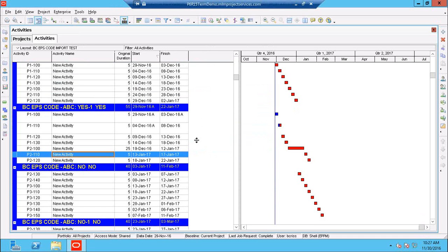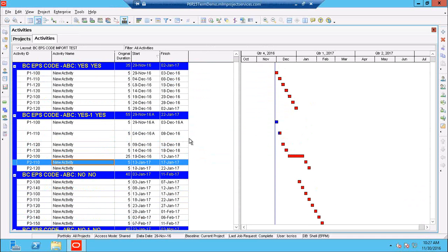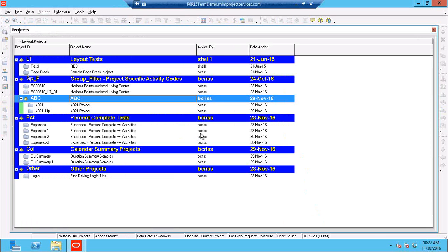And in fact, here I can see I've got both projects open, and the code values are there, and they are viewable within each project. So this is the one way that I did find, and the option to say update existing, as I mentioned, probably has a lot more risk based on what data might get lost or not come in cleanly. I think we all prefer to create a new project when we do an import so that we can do our analysis.